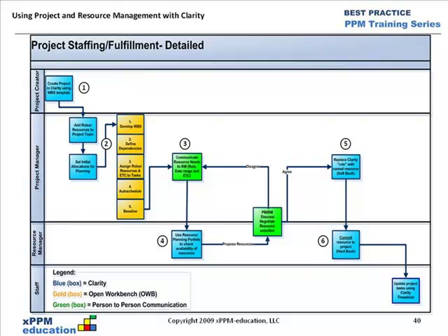Because right now, the allocations are sitting at broad 100% start to finish, and we need to profile those based on the ETC plans. So we'll do something called allocate from estimates in number 3. And then we're really ready to communicate with the resource manager.